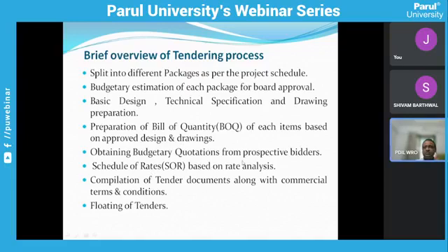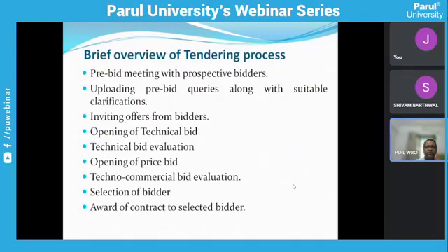And then budgetary quotations from the prospective bidders are taken, and based on that, the SOR, that means schedule of rates, is prepared. Based on the quotations, we have to do some rate analysis, and the SOR is prepared, and this is also part of the tender documents, and the entire tender document is floated for bidding. Once the tender is floated, the prospective bidders start quoting, and before opening the tender, one pre-bid meeting is organized for resolution of various queries raised by the prospective bidders.